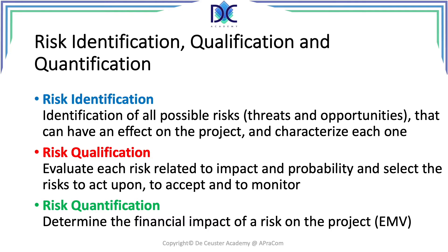Let us now have a deeper look into risk identification, qualification and quantification. Risk identification is about identifying what risks, threats and opportunities can have an impact on the project. All identified risks will be entered in the risk register, and it will also contain information about the impact and probability, the time horizon of possible occurrence of the risk, a risk owner, and other useful information.